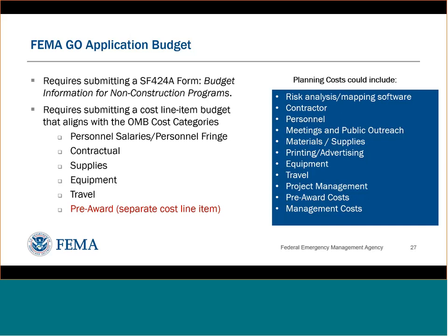So when you're going through your budget, if anything is pre-award, it's occurred as part of that development. I can pull up the definition here, or maybe Ravi, you can drop the definition of what constitutes a pre-award in the chat. Just make sure it falls within the time period aligned with that definition, and then when you put it into FEMA Go, you click it as a pre-award cost. So we can make sure when we're reviewing that it's appropriately categorized and taken care of.